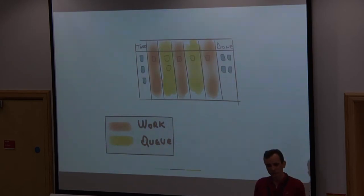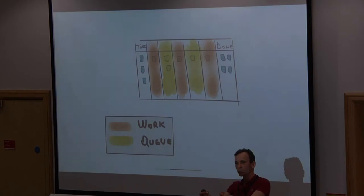So one thing that we've done is we have created, the way we created our Kanban system, that we have interjected between any work column, a wait column or a queue column. So Kanban by default works really well if you implement a pull system. So the items should be pulled downstream as opposed to pushed upstream. Having a column between the work items, a queue column, that is very easy to achieve that. As an example, if I'm a developer, I would have a column saying Develop In Progress, I would have the issue with me, I would do the development. When I'm done, I'm moving from Develop In Progress, which is a work column, into Develop Done, which is a queue column. I'm taking my avatar off, I'm going away and do something else. What happens then when there's capacity downstream, as a tester has capacity, they would pull the system in work tray and put it in Testing In Progress, do their testing, when it's done, moving to Testing Done and so on and so forth. So a little trick that helps greatly to achieve the pull-based system.